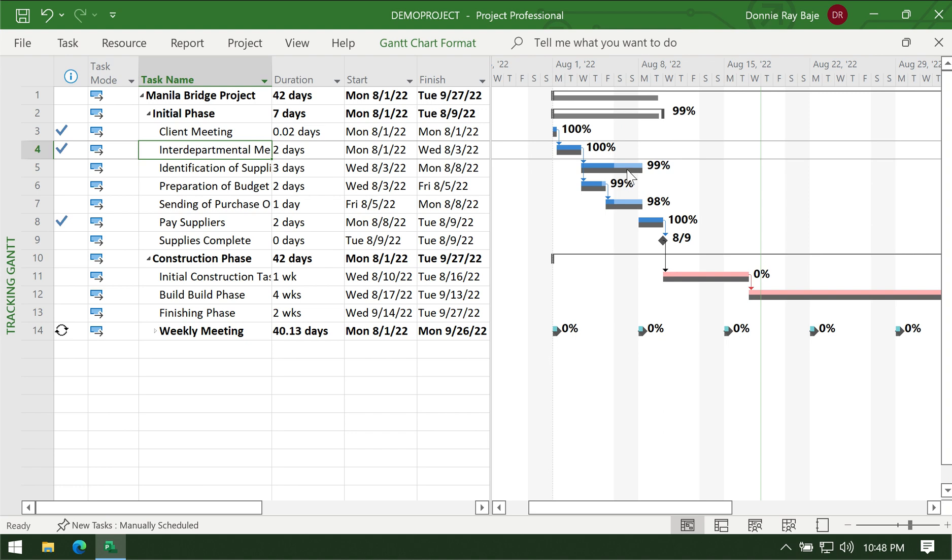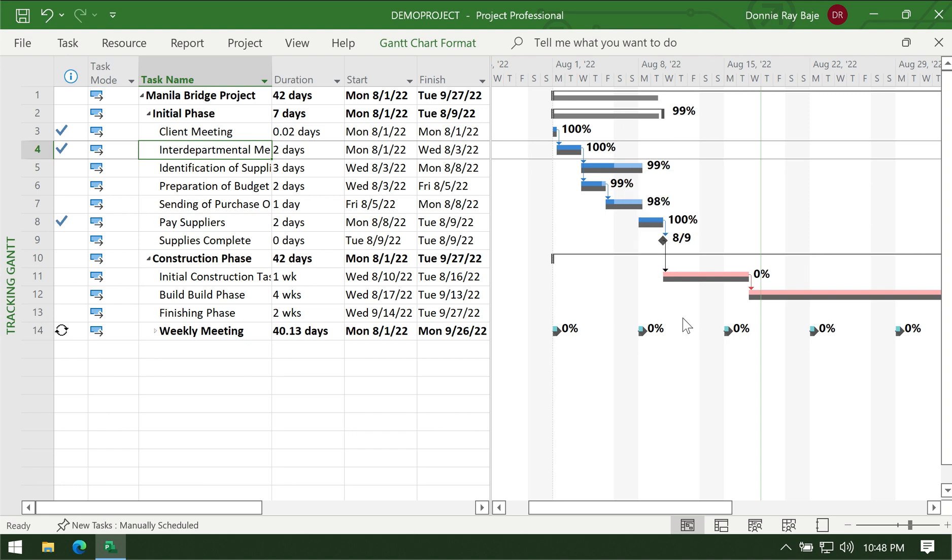Bars that are red or pink are critical such that if they become delayed then the project will be delayed. They determine if the project will be late. On the other hand, if you notice the blue ones, you can actually delay them and the project will not be late because the way that they are plotted in the timeline will not affect the overall completion date of the project.